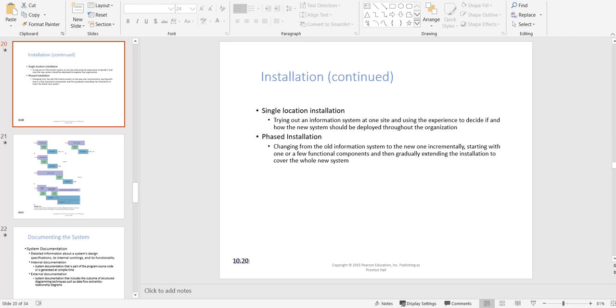The downside of this is that you have to have good compatibility between the new partial application which you are releasing and the old, existing one. Let's say you are releasing 25%, then another chunk of 25% of your application every 3 months; it still has to work with the old application. So you need a good way of converting the data, or of data being able to travel between the new and the old application.